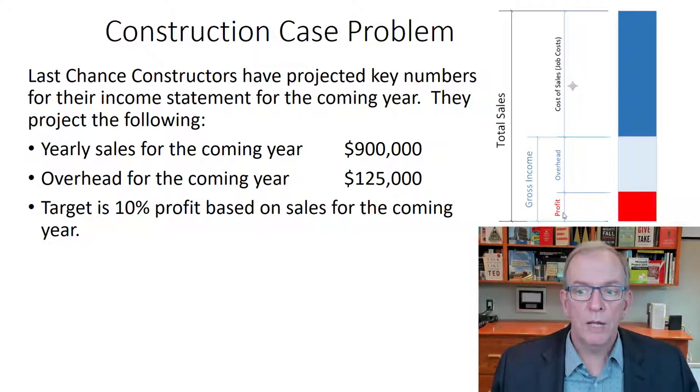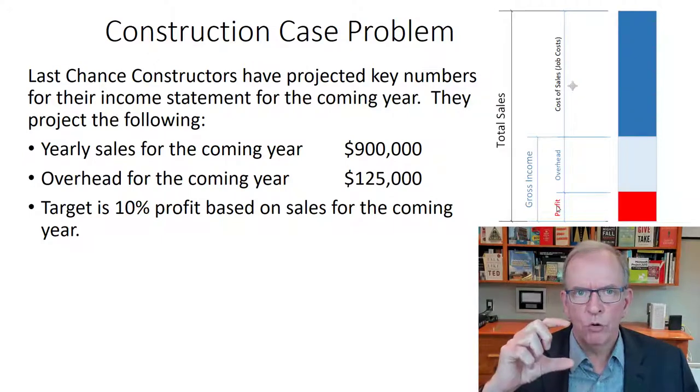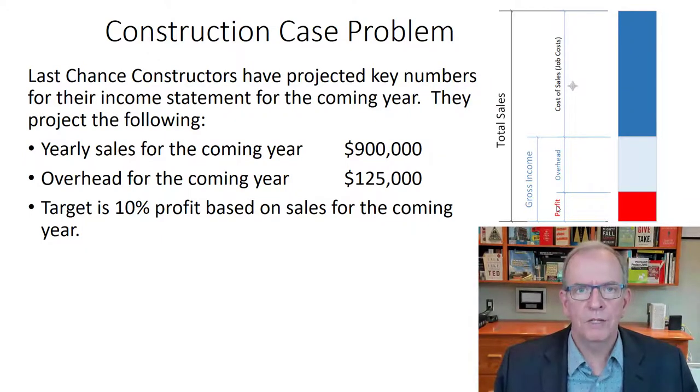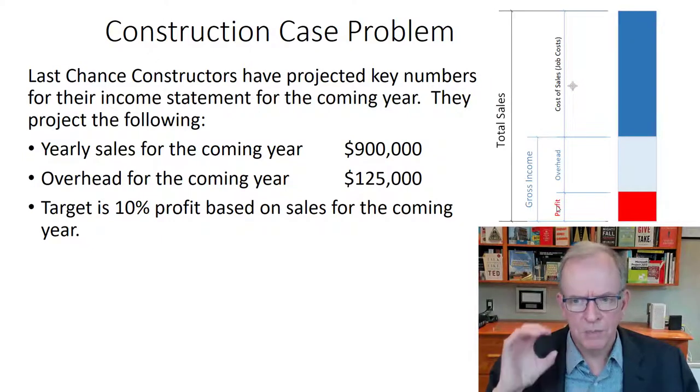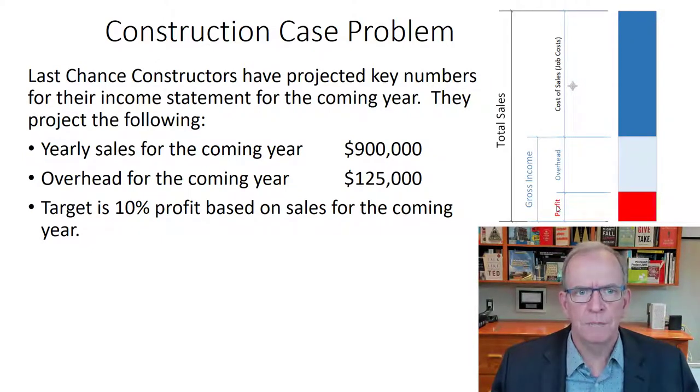And then, of course, we want to eke out a profit in this industry, right? In the previous lecture, we looked at profit and we said you might be at 8 to 10%, but it also depends on the risk level and the types of jobs that you do. If it's a cost plus type job, it might have a lot less threshold or premium for profit just because there's less risk. If it's a lump sum with liquidated damages, it should carry a bigger premium because you're taking on a lot more risk. So those aspects, but we've got to have a target for that for our business.